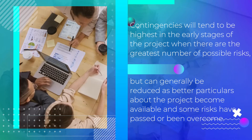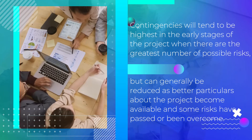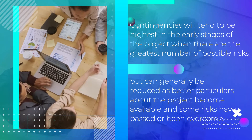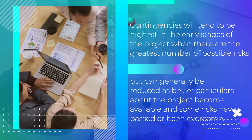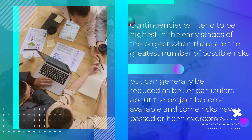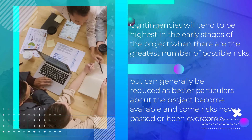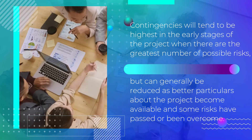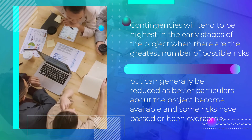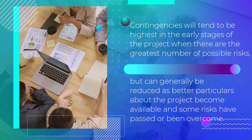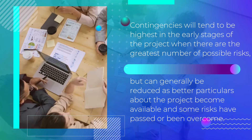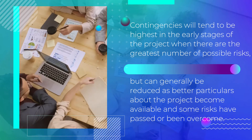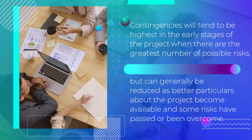Contingencies will tend to be highest in the early stages of the project when there are the greatest number of possible risks, but can generally reduce as better particulars about the project become available and some risks have passed or been overcome.